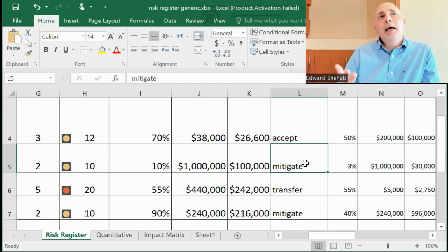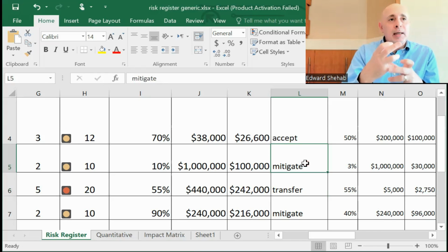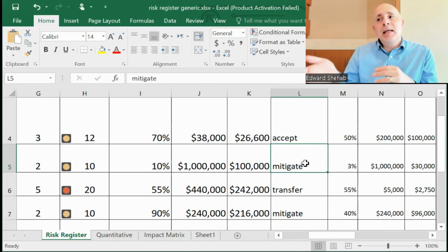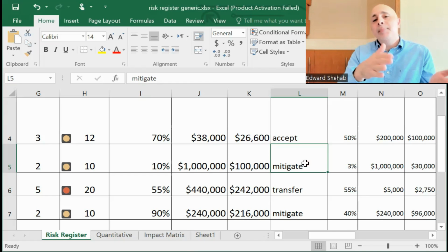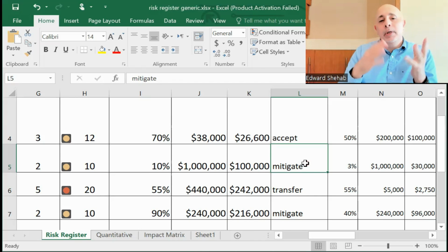Let's say there is no option for this, then the next thing that you want to do is mitigate. If you want to mitigate, it means you want to reduce the chance that something will go wrong, or you want to reduce the impact if something goes wrong. Either or, right? So you will need technical expertise to figure out how to reduce the chance. If you're shipping product, maybe the way you pack it, or maybe you need to treat the material in a certain way so it doesn't get damaged or rusted by shipping by sea. Or you want to reduce the impact in case something happens. The impact you could reduce by padding. You can pad something so that if it moves, nothing goes wrong. But anyways, you'll need technical expertise from people, not from yourself, to see if you can reduce probability or impact.